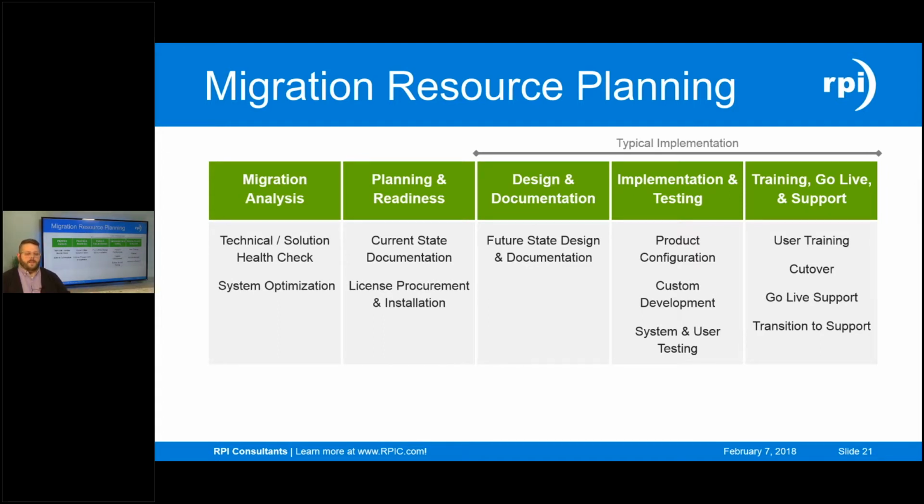First is our analysis. We want to do health checks on the existing system to identify any weaknesses, identify our requirements, optimize those solutions and systems before we ever even think about a migration. And these are important to do anyways. The benefits of optimizing your existing solutions are there even without a migration.